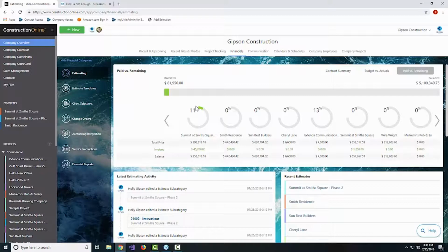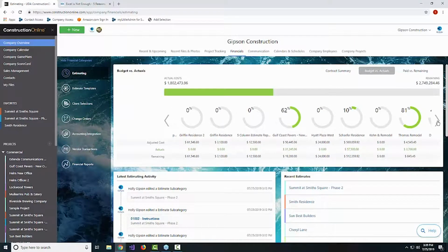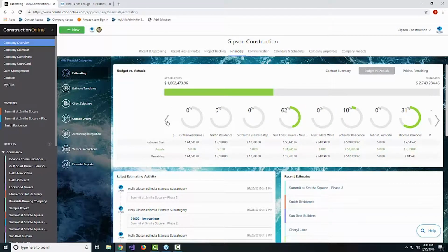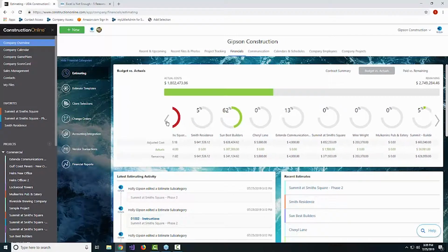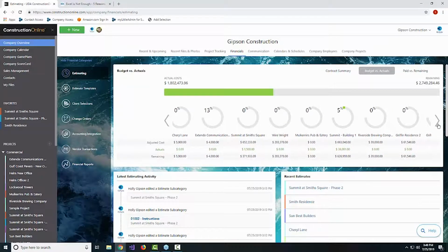What we might find is that if you go back to the budget versus actuals, that 289 is actually the one place that we've been putting all of our costs for all of the projects that we work in that subdivision. Maybe we just haven't been breaking up our actual costs properly. That might be a side effect. The alternative is I'm going to figure out who our super is on that project or who the project manager is on that job and probably have an interesting sit down with them to discuss. But again, if we're here, we can identify those problems immediately. It would never normally get to this point without us catching it well ahead of time. And this type of report gives us that tool or that utility.